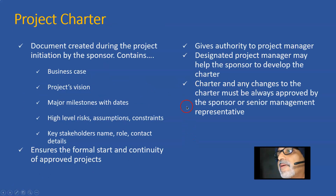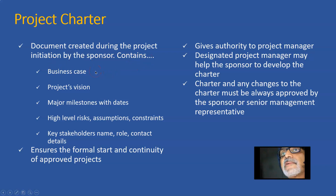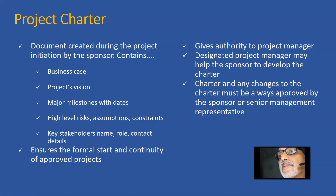For those of you who are new to the project charter: it is a document created during the project initiation by the sponsor of the project. It contains the business case of the project and the project's vision. It contains the key stakeholders' names, roles, and contact details. This includes the sponsor's details as well as the project manager's role, contact details, and name.